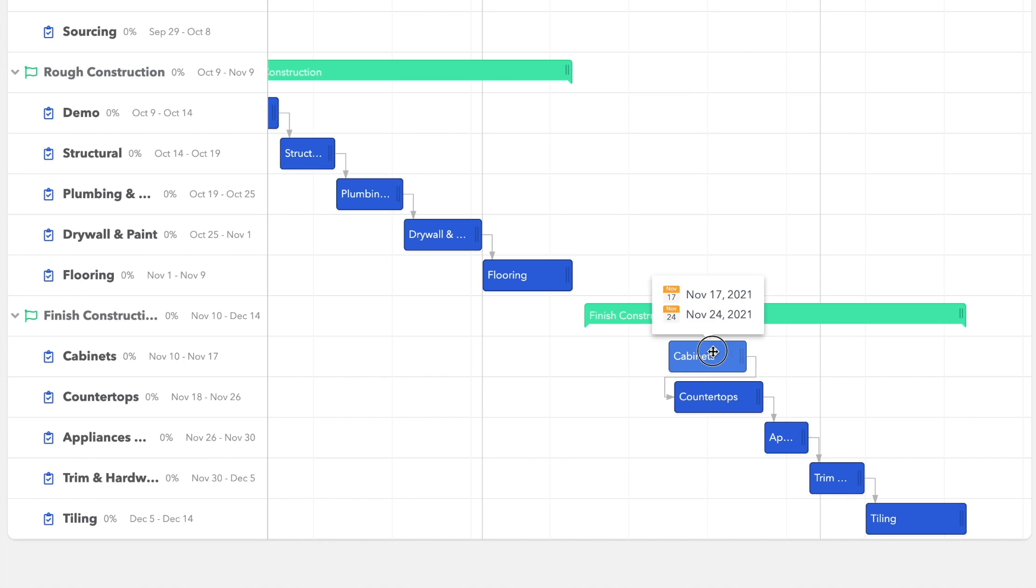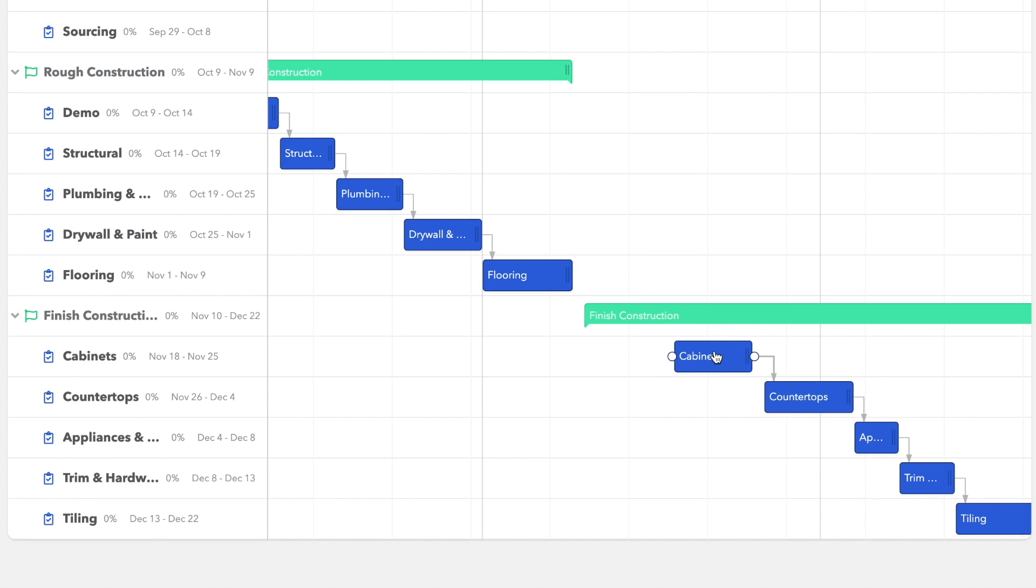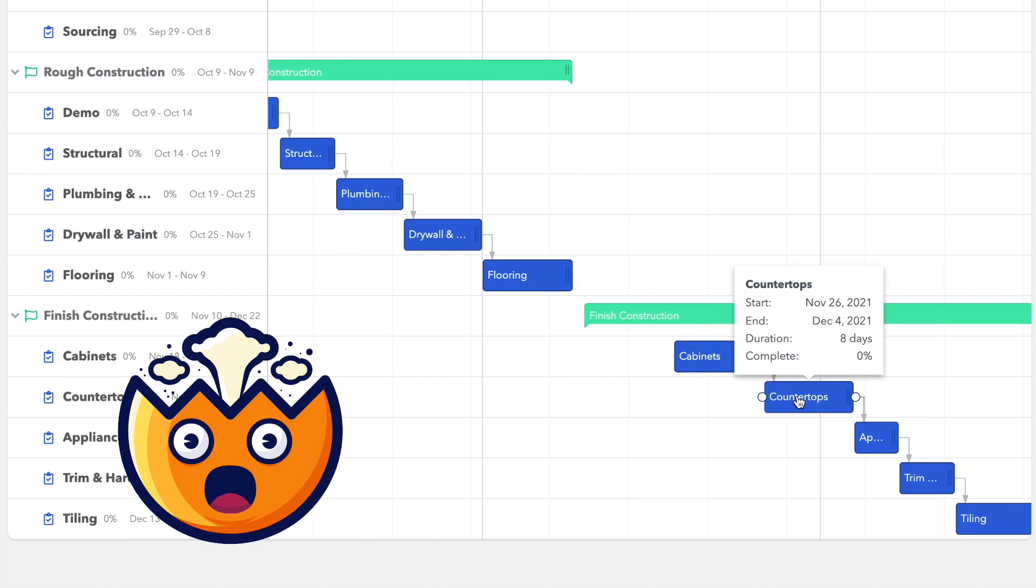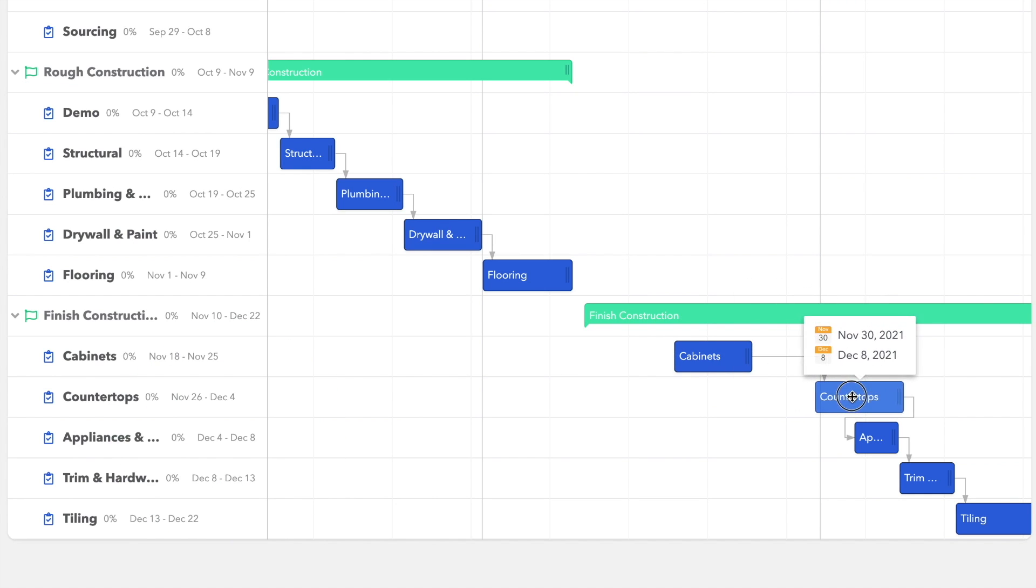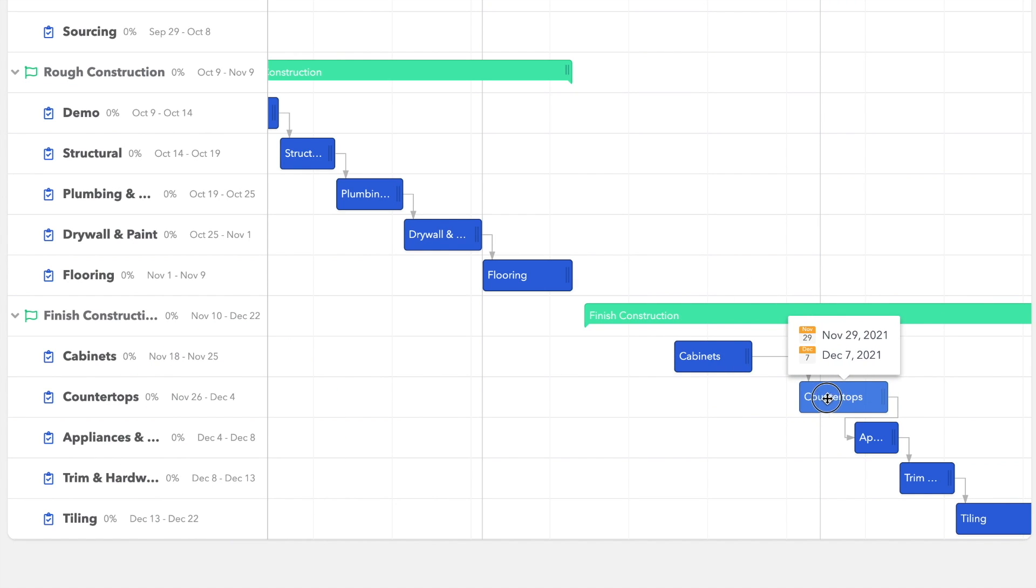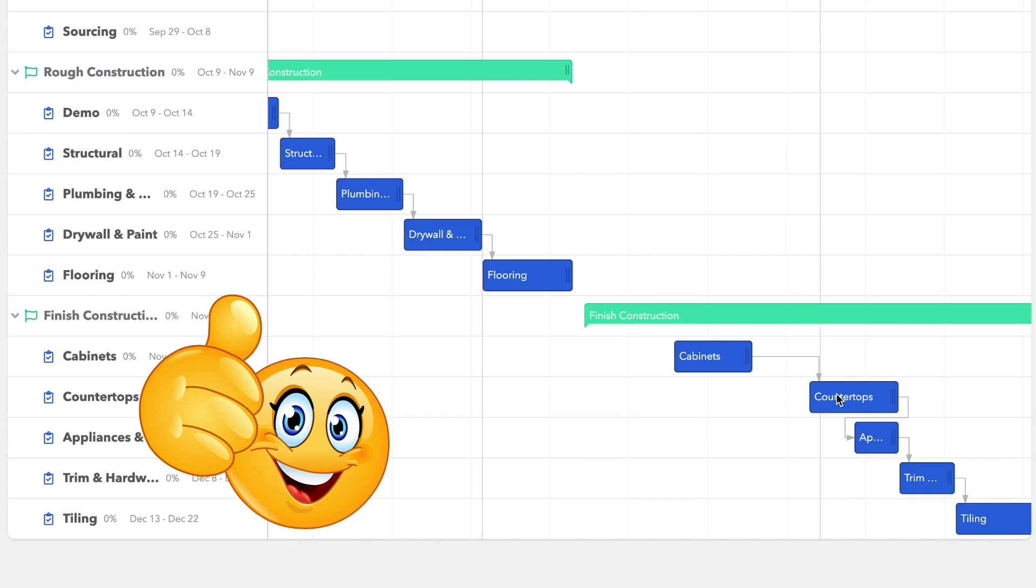So now when I move a task, the dependent items move with it. So if cabinets slip by a week, countertops and everything else connected will automatically shift. And now you've got a solid schedule set up.